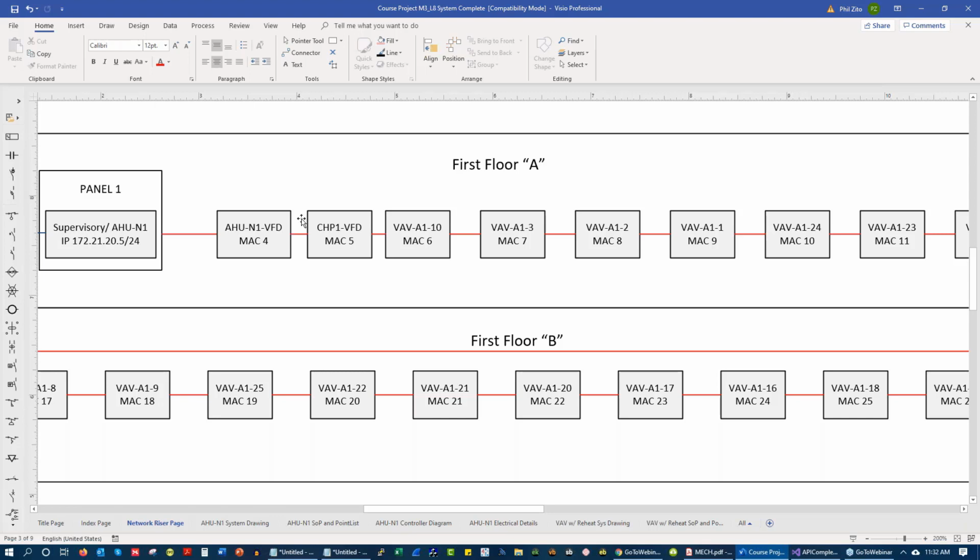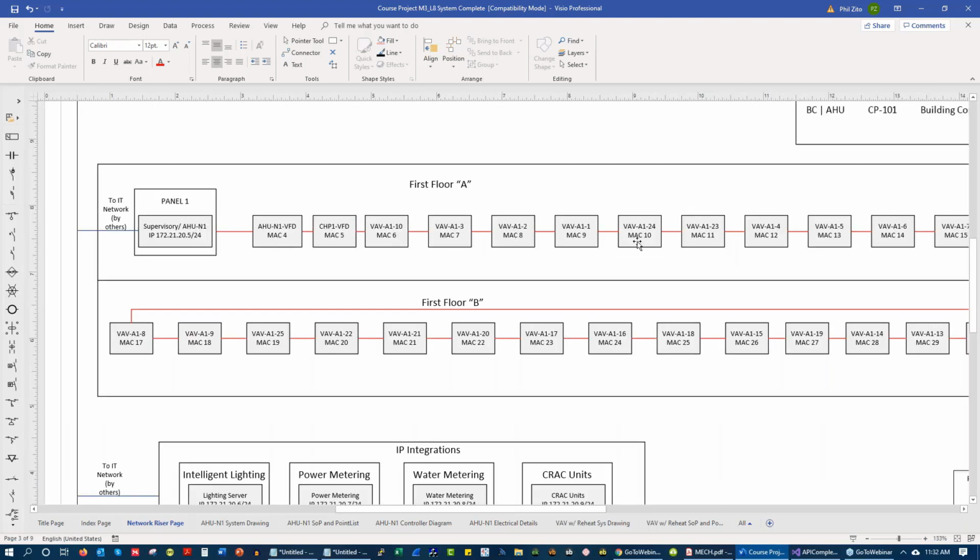And then what we would do, and here's the key, right? You would do this initially where you would just lay these out. And then once this is actually done by the electrician, you would validate that this is the order they were wired in. And once that is done, and this is where folks are going to get a little conflicted, because there's two ways you can do this, right?